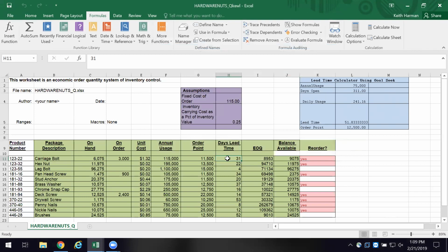What would concern me there on that lead time column? The longest ones, why is that? Exactly. And the longer it takes the part to get to me, the greater the chances that something bad will happen. They take 31 days to get it to me. And between those 31 days, they have this massive snowstorm like we've had where all the flights get canceled and they've got feet of snow.